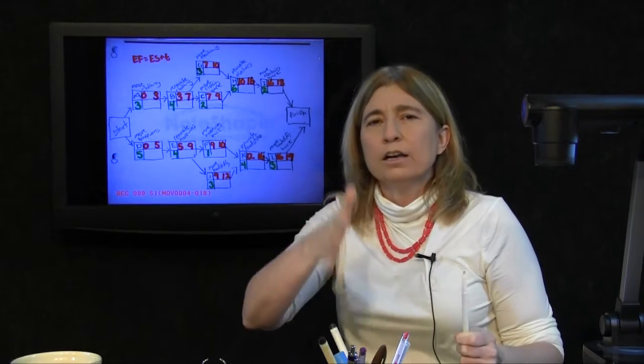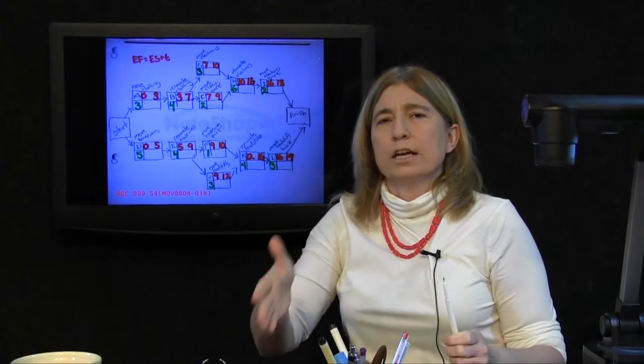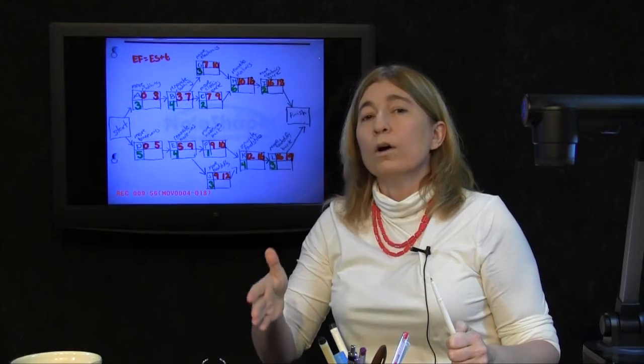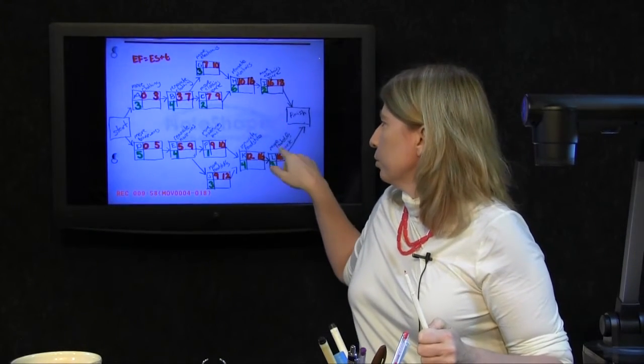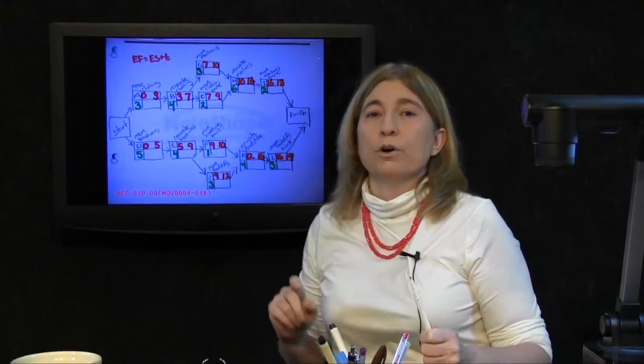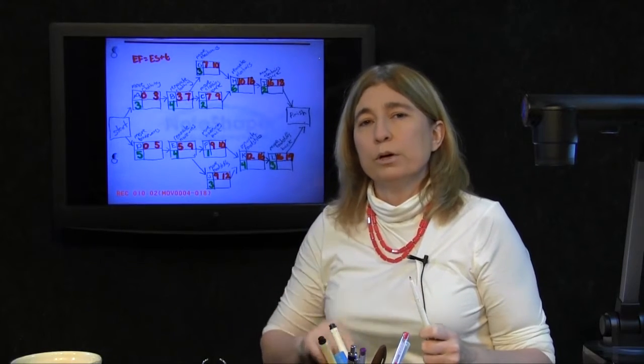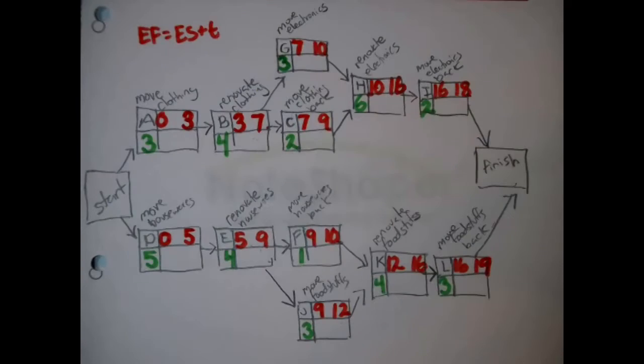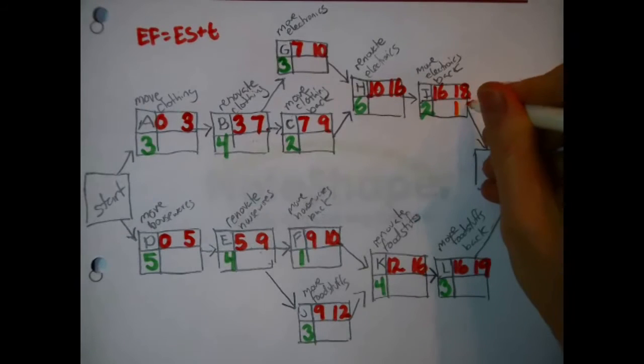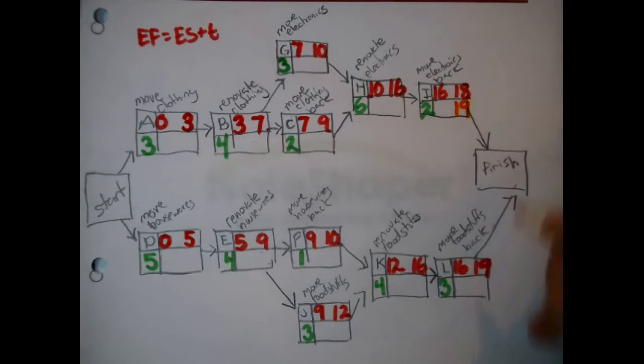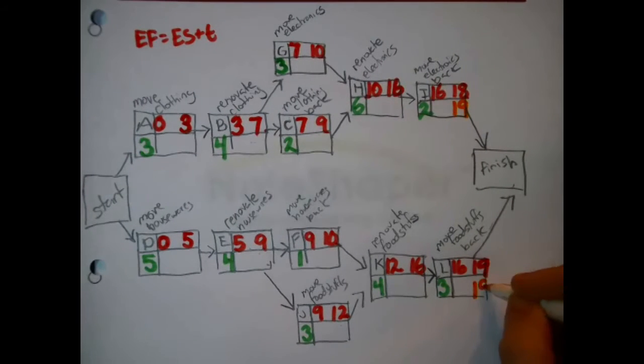We say, fine, therefore, Megamart needs to get done in 19 days. Oh, therefore, look at who is attached to the finish node. The very latest we will tolerate them being finished is 19 days. That automatically becomes their late finish times.